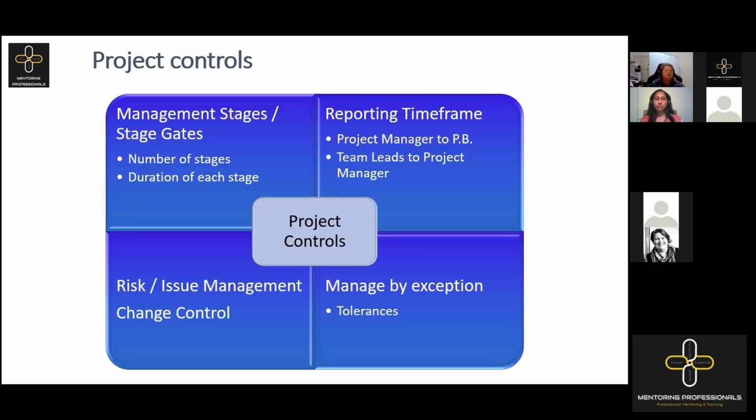And of course, we're not waiting for a particular board meeting to happen. If there is a tolerance that is expected to actually be exceeded, then we need a decision about what needs to be done to be taken straight away. Waiting 4 weeks potentially is not actually a good thing, because we've automatically lost control of our project.